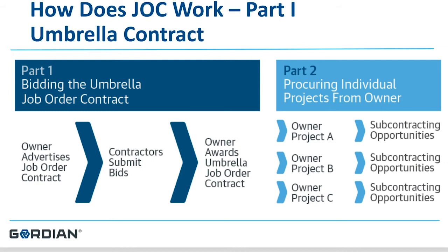When an owner would like to engage with the job order contract, they simply alert their contractor to the fact that there is a project. The contractor looks at the project with the owner and any subcontractors that may be involved. The contractor takes thorough time to examine the scope of work and any contract drawings, then returns to their office and uses Gordian's system, which gives them electronic access to the construction task catalog.